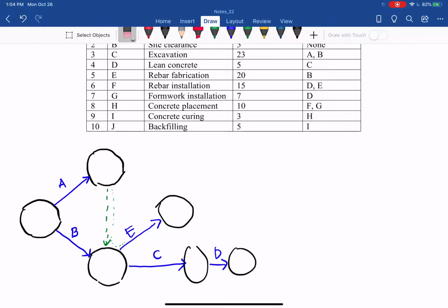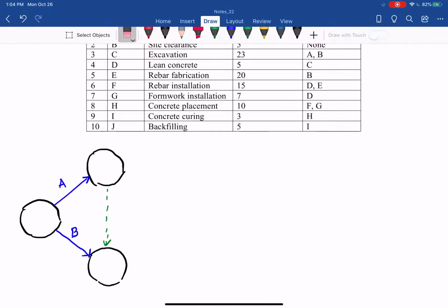And in this case, I just erase that. It looks like starting C from the end node of B is not good. Let's try the other way around. So I erase this one and try the other way around. Instead of C coming out of the end node of B, I can make that C on this node. So C follow A, and then C has to follow B.